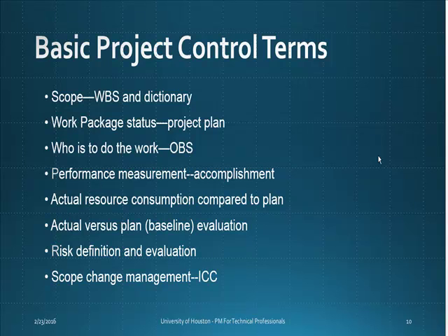In the next phases, the project execution phases, you start to do the work and you benchmark how much work you have done against your baseline. If you follow the baseline, it means you are on the right track. If you are falling behind the baseline, or your cost exceeds your baseline cost, then there are problems there. That's how you evaluate the project performance.